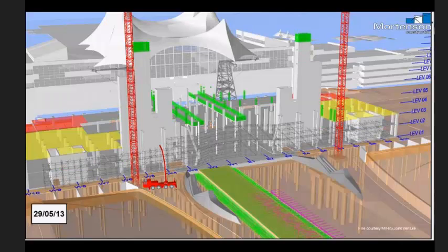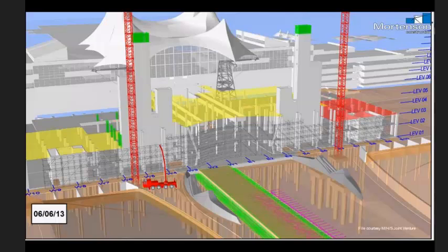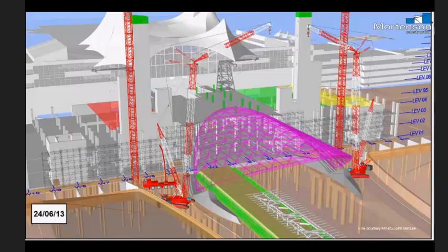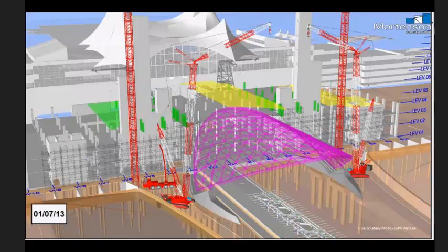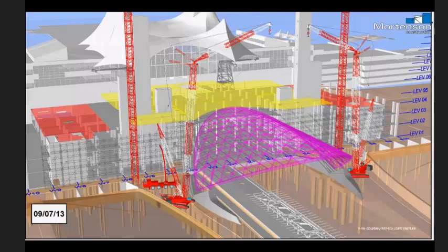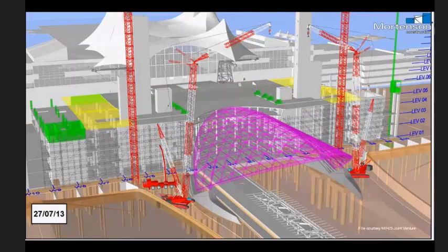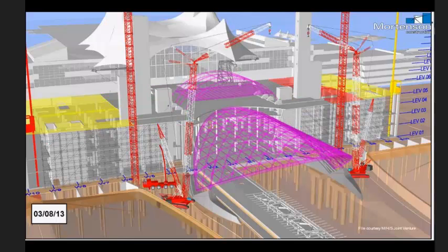We're trying to locate where our concrete pumps would be for concrete placements. We'll show access routes for concrete trucks coming in here. One of the major challenges here is that we've got a major piece of steel set here, and if you're a general contractor, you looked at that and just said, wow, that was pretty interesting how that just showed up in one block. What we need to do, obviously, still is work on the exact sequence of how that goes in with shoring towers and where those will be placed here and where we can lay down steel in that process.